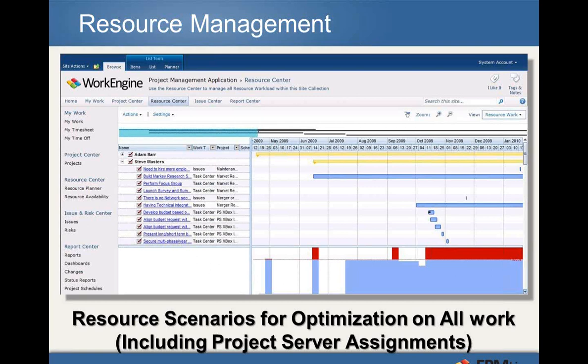The idea is that total workload is now going to be focused into this so I can see capacity versus demand for this resource from the bottoms up of all the work assignments. But here in this view, I can actually try out some things like move some tasks around, see if I can relieve this overallocation, drag and drop tasks into different time frames or to open spaces of availability, and see what might work from that perspective. So the interactive nature is something that we add. It's not just a static view.